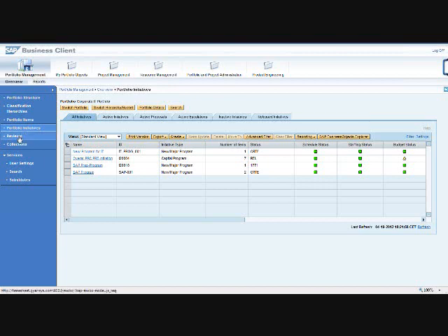Reviews are just different projects that you can group together and report on. You can also use workflow to create a review automatically. Let's say a project is forecasted to start April 1st, but here is today, and we're already in the middle of April. We can have a review that, if it hasn't actually started, pulls that project into a dashboard so you can have that management-level review and dashboard.